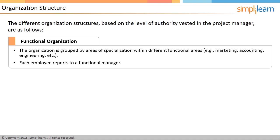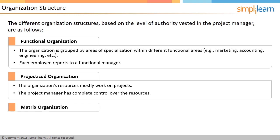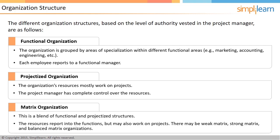Team members do their normal departmental work in addition to the project work. In a projectized organization, there are no departments — the organization's resources mostly work on projects, team members report to a project manager, and the project manager has complete control over the resources. When a project is completed, team members either move on to another project or look for work outside the company. The matrix organization is a blend of functional and projectized organizational structures. A team member belongs to a department as well as being part of a project team, giving them two bosses: their department head and their project manager.